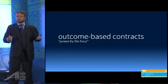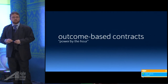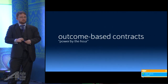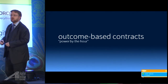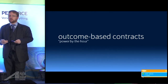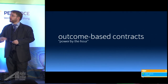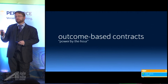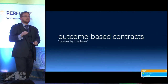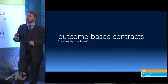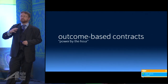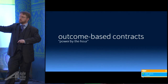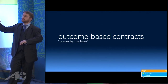Software as a service — yes, that's an outcome-based contract. Subscription-based models, absolutely. What about outside a subscription-based model or software as a service? Maintenance. Maintenance contracts tend to be better as a combination of a capped T&M fixed-scope or fixed-time contract with an outcome-based incentive on top.